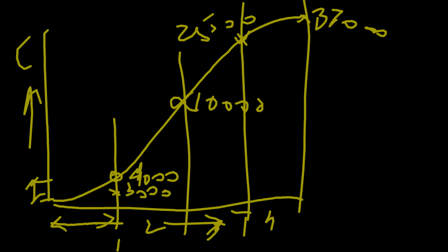So your earned value is 3,000 so far. 4,000 was your planned value at that point, and 3,000 is your earned value by this point, because that point is past now. At that point, you could achieve only that much job which has a budget of 3,000. Got it?